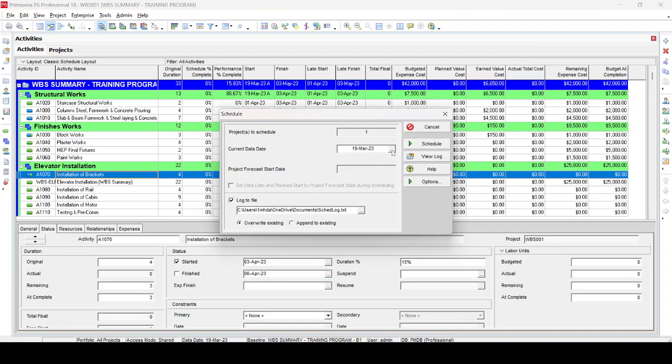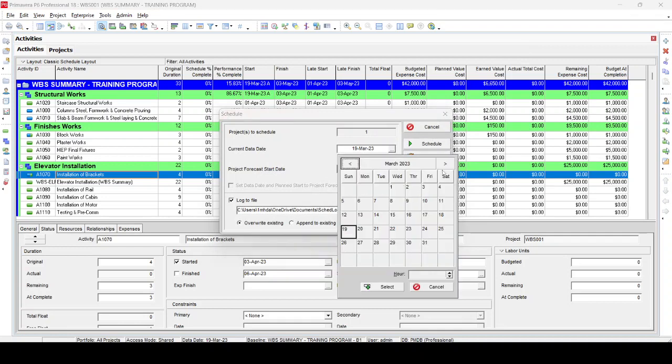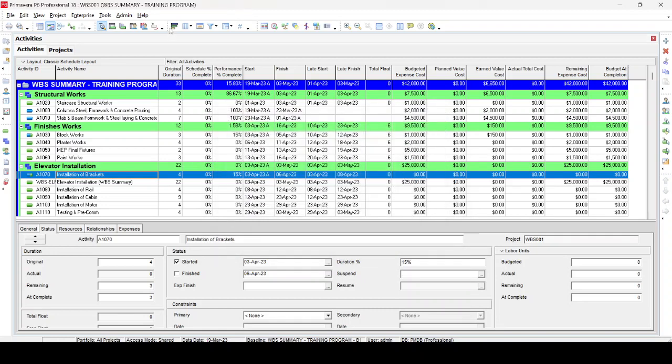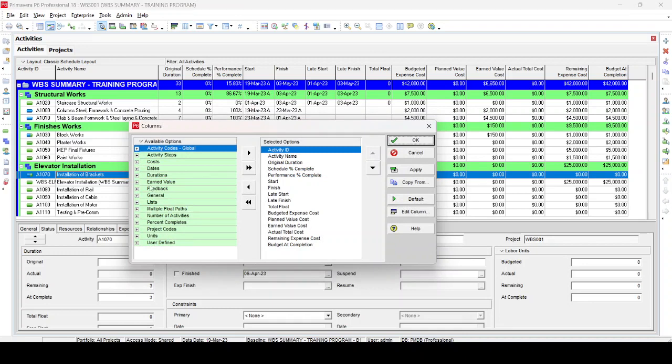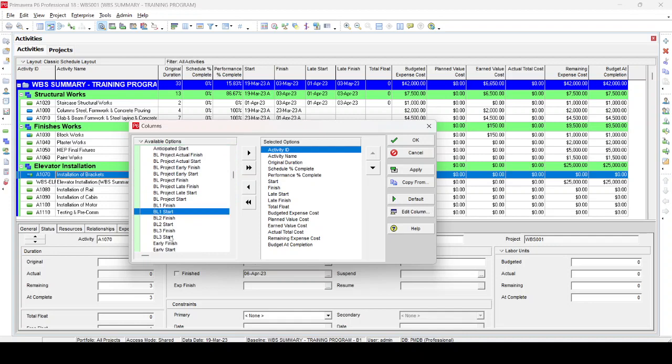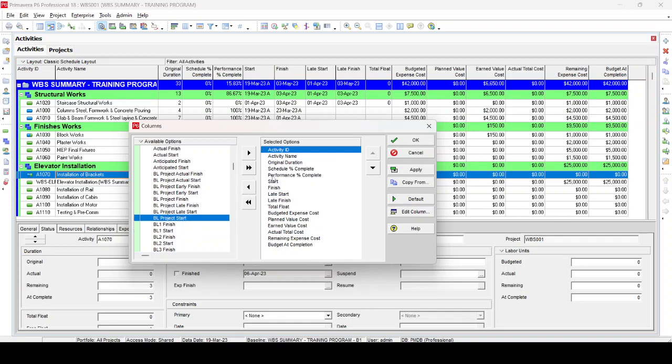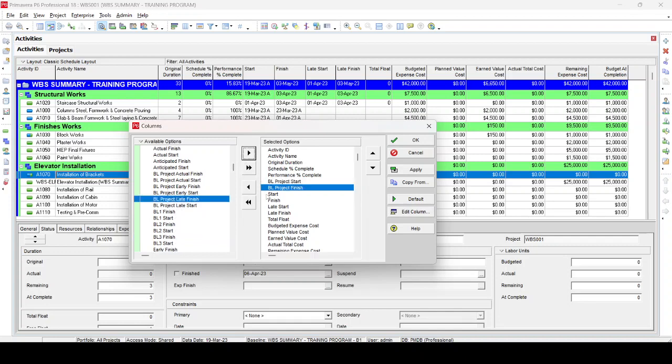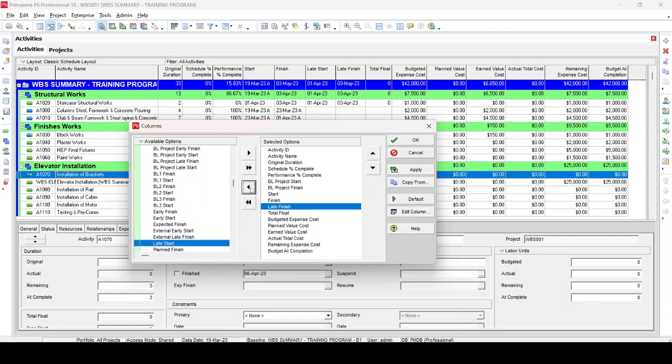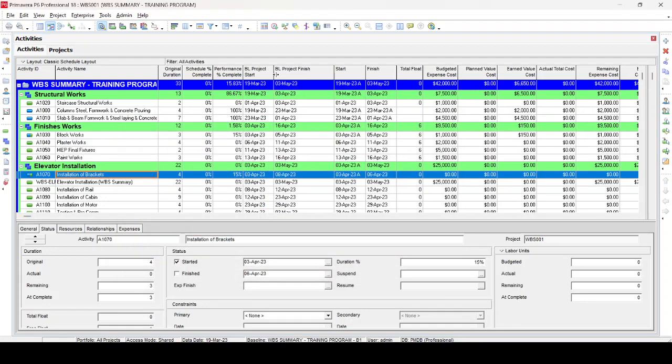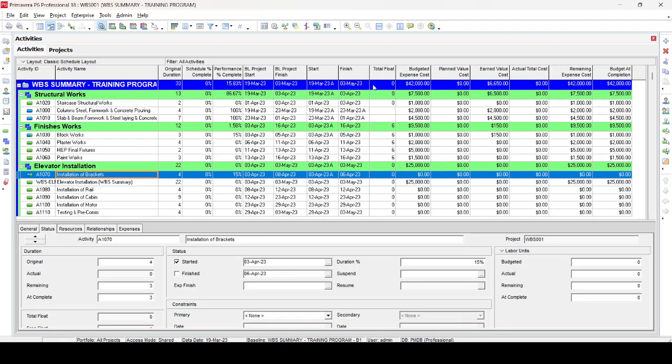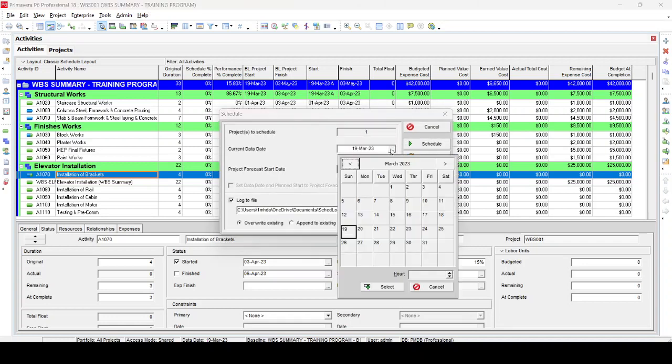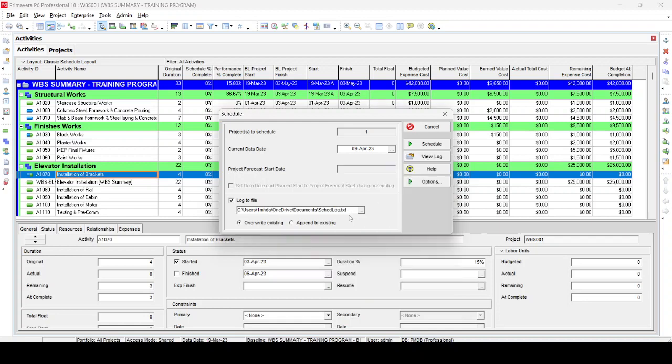So this is 19 March, so we go after three weeks to 9 April. Select this one and then just update this program. Before updating, I prefer we will add the columns for the baseline dates. So we open the date section here: baseline early start, baseline project start, and baseline project finish. We just remove actual start, actual finish, and then OK. We have baseline start, baseline finish, start, finish, and all these columns required. Then we run again after three weeks. We are assuming after three weeks, 9 April.